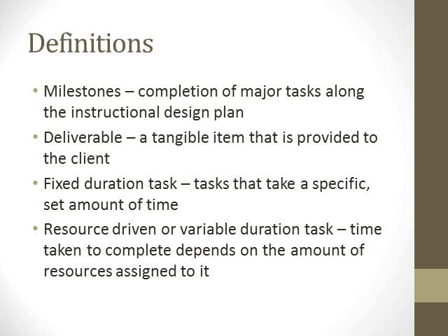However, if you had a team of people, you might be able to schedule them all for one day and get them all done in an 8-hour period as opposed to a 40-hour period. So depending if the task can be done quicker with more people, it's resource driven or variable duration. If the task is going to take the same amount of time no matter how many people or resources are assigned to it, it's fixed duration. So those are some important definitions that we need to keep track of while we're working.